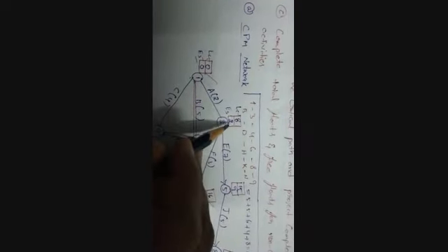In the network diagram, 1 to 2, what is the value? So LCJ, that is the latest completion time 8, will be taken, minus ESI, the earliest start time 0. So here latest completion time 8 minus earliest start time 0 minus Dij. We know that the 1 to 2 activity duration is 2. So this is the process we have to follow for finding the total float for each activity. The same procedure will be followed for all the activities.